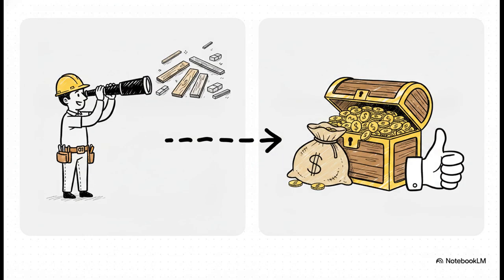This partnership builds directly into our next critical pairing, the estimate to complete versus the job margin. You have to remind your teams constantly that the ETC, that exact cost required to finish the job, belongs completely to the PM. It's their data, they own it. The resulting job margin, however, is the output. That's the number that tells the entire business whether that job was actually worth winning in the first place. The ETC is the cause, the job margin is the effect.